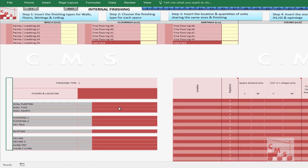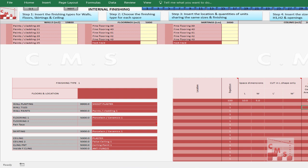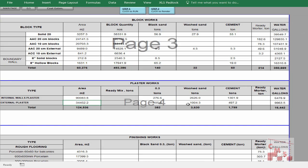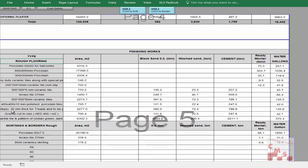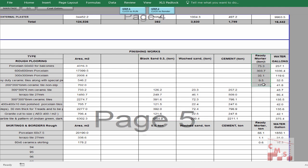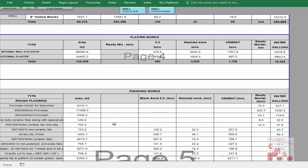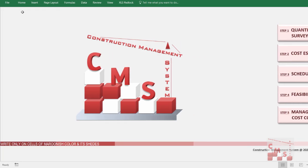For finishing work — for any internal location — when you insert only the type of finishing, CMS imports data from AutoCAD and gives us the required quantities directly for plastering, flooring, skirting, and ceiling with all types of ceiling. This information is also reflected in the quantities takeoff: the amount of plaster, all types of finishing, flooring, skirting quantities, all required material — whether ready material, ready mortar, or site-mixed mortar — even the water required.